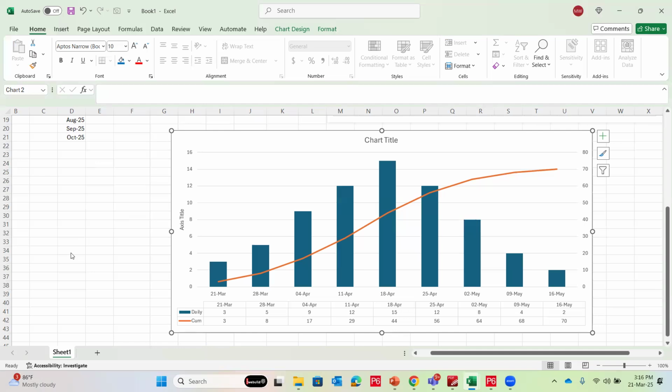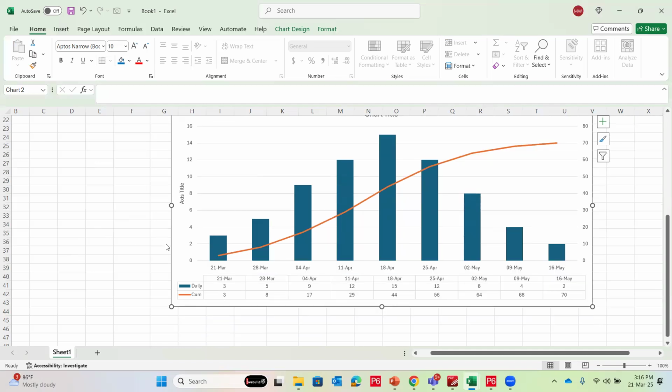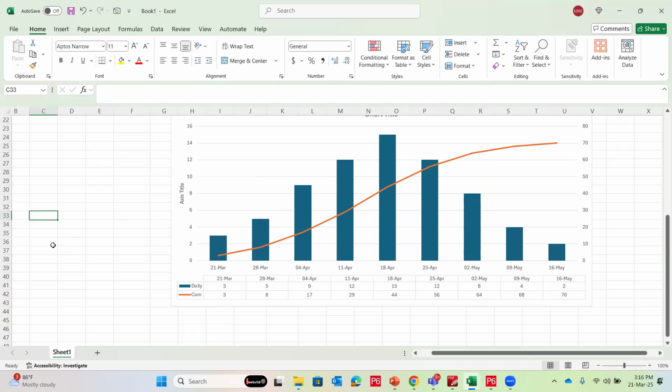So what happens is normally in any project, there are 3, 4 things. Because you see here it's 3, then 5, then 9, then 12. So there are multiple things. Your mobilization is ongoing, because you cannot mobilize all the people required here in one day. So you will go by 5 people here, then 10, then 15, then 20. So mobilization will go like a ramp. Every week you will increase your manpower. Then maybe there are some design issues. Design is not complete. Technical shop drawings are ongoing, so you don't have all the shop drawings.